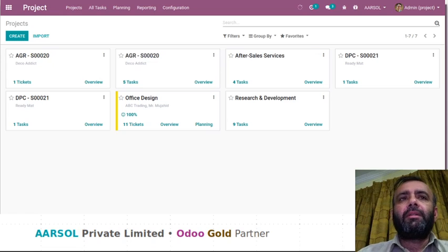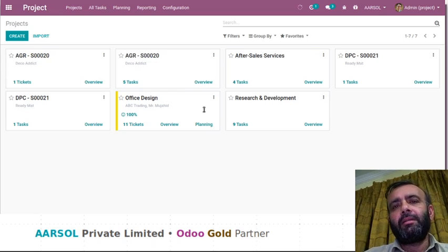So first of all we will see what the tasks are and what the role of overview and the planned window is. In Odoo, a task is a piece of the project that can be assigned to employees to perform a portion of the project. And a task can again be split into subtasks if we have enabled that feature. The planned refers to the assumed time to complete each task. And as far as overview is concerned, overview is the overall report of the project in accordance with its timesheet and sale order. It shows the complete details of the project like timesheet hours, forecast, profitability, and so on.